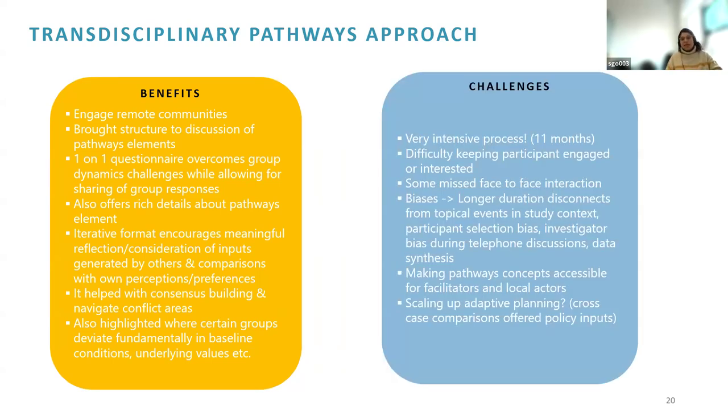But we also faced, obviously, a lot of challenges in the process. One, it proved to be very intensive. The whole process took 11 months from start to finish, but that includes the time it takes to develop the methodology, train the facilitators, and then actually conduct the three different rounds. And because it takes so long, it's difficult to keep participants engaged or still interested over that period of time. Some participants naturally miss face-to-face interaction. I mean, as did we, but really in this case, we were just forced by the pandemic to go this route.